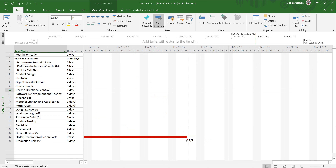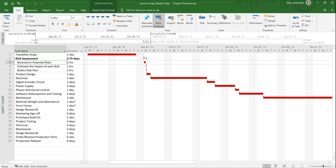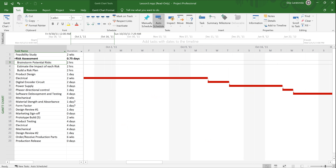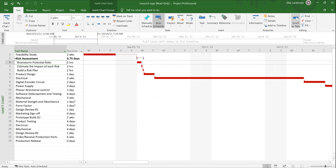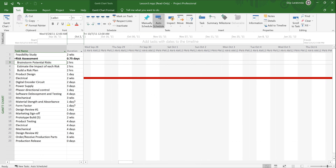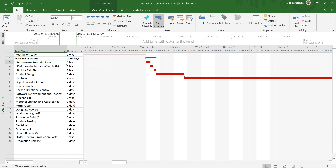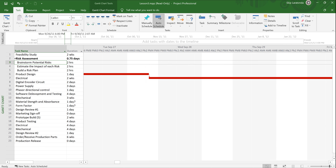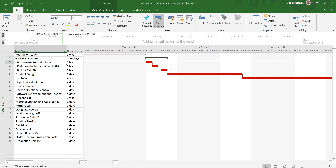I'm going to click Scroll to Task and zoom in so you can see — there's the summary bar. Risk Assessment is a summary task, and the subordinate tasks underneath it are Brainstorm Potential Risks, Estimate the Impact of Each Risk, and Build a Risk Plan. I can zoom out a bit more so you can see that as a grouping.